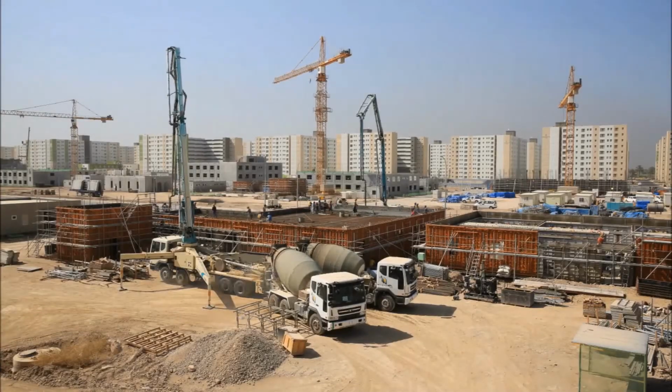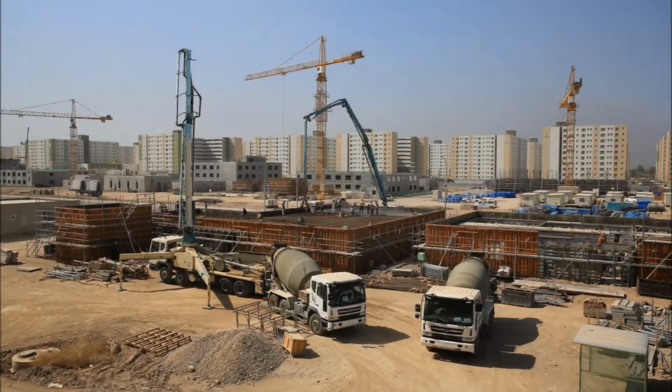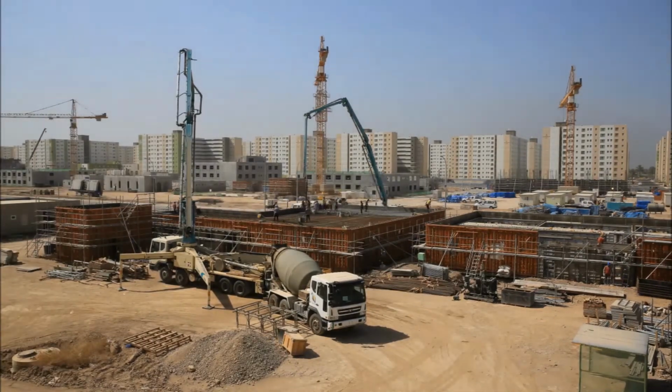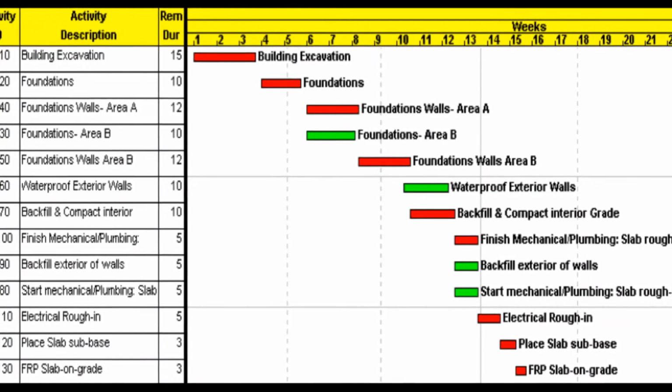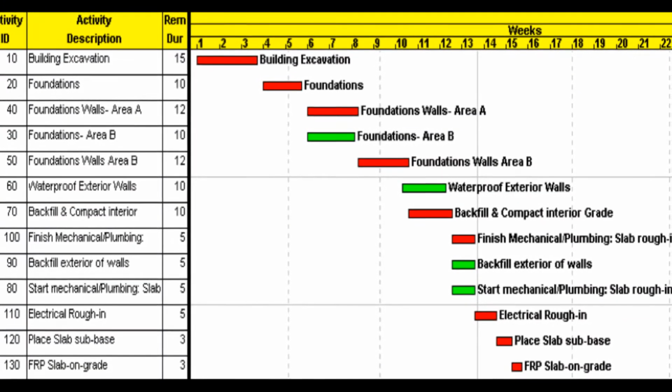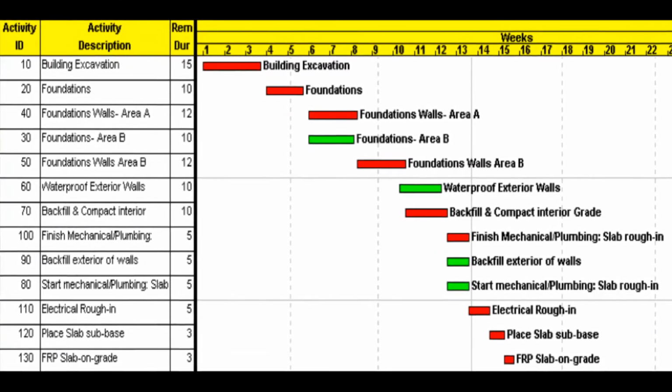These checks will focus on activities that are either currently planned or in progress and will exclude all summary tasks, milestones, or level of effort activities. This will allow the assessment to filter out all activities that are just grouping activities and will avoid any duplications in the results which could come from the milestones.